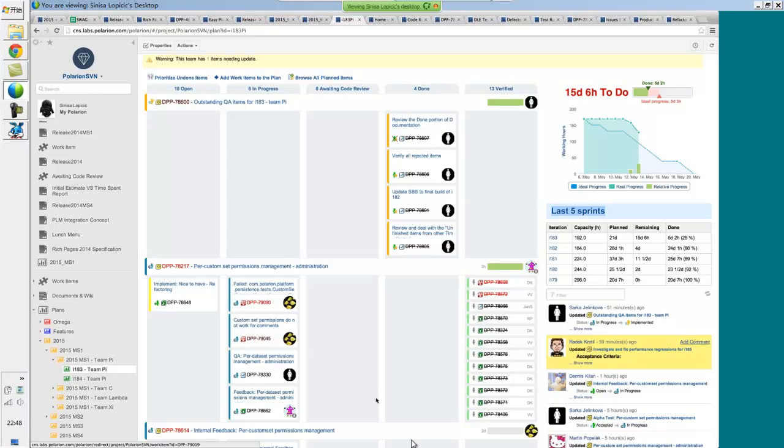There could be drawings also added to this. So this should be pretty much clear to each person of understanding what this user story constitutes. This is actually a very good sample of one of the user stories that went quite a bit bad. As you can see, it was estimated at 12 days, and we've actually spent 30 days on it.